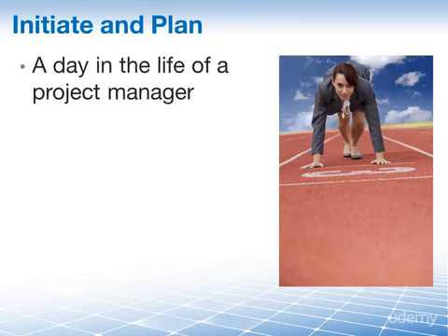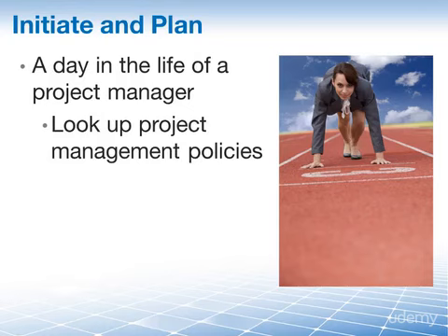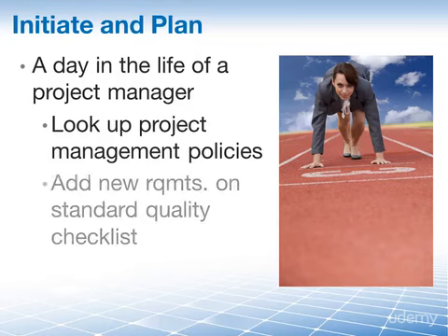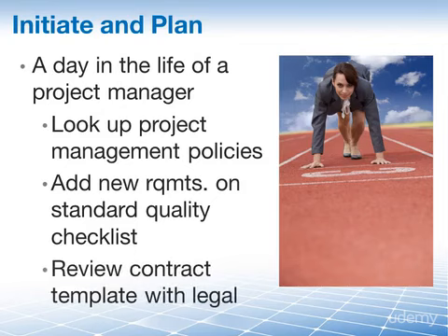We know a certain amount of work occurs early on in a project, in initiating and planning, and organizational process assets help us project managers to hit the ground running by giving us a starting point to launch the project. We'll have to look up project management policies, add new requirements to standard quality checklists, and review a contract template, maybe with our legal department.